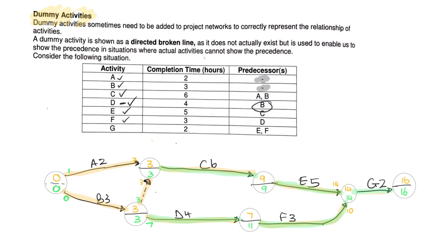Now this is where doing your critical path is going to be a bit different, because we need all the nodes that have EST and LST the same. I've coloured those in. So we need to think, well, that joins there. This joins here. This joins here. Now, does this node join to A, or does it come down here to B?